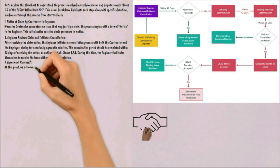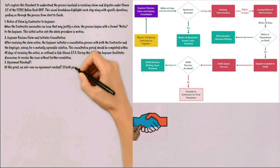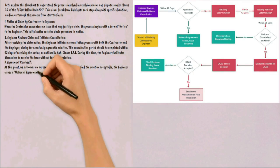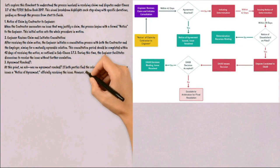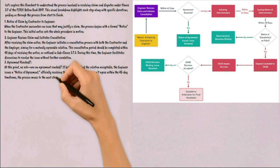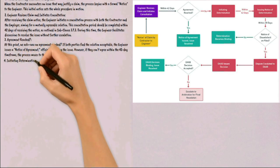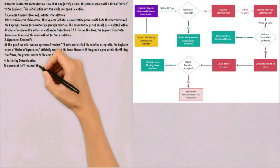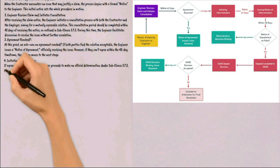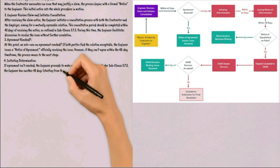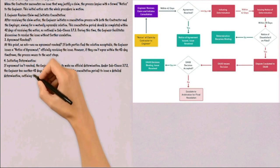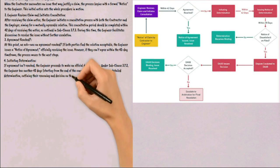Step 3: Was an agreement reached? If both parties find the solution acceptable, the engineer issues a notice of agreement, officially resolving the issue. However, if they can't agree within the 42-day timeframe, the process moves to the next stage. Step 4: Initiating Determination — if agreement isn't reached, the engineer proceeds to make an official determination. Under Sub-clause 3.7.2, the engineer has another 42 days, starting from the end of the consultation period, to issue a detailed determination outlining their reasoning and decision on the claim.